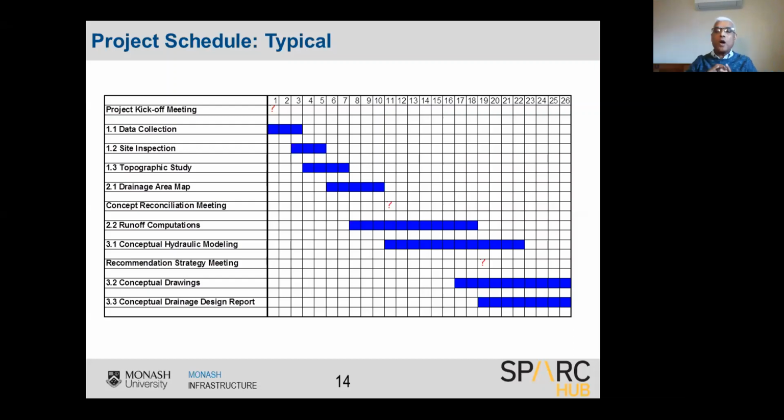Each milestone, how you are going to achieve that milestone. Using the work breakdown structures, go from top to down, prepare a simple chart, simple schedule like this with the activities, and allocate the resources, including the in-kind contributions of your part investigators. So where the part investigators' input comes in, where the chief investigator's input comes in, including the in-kind, plus the cash involvement. Prepare a simple chart and then monitor it.